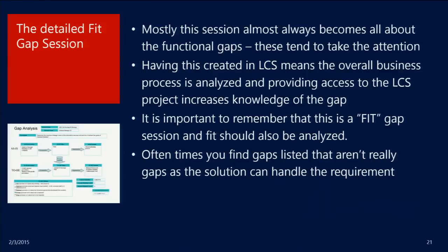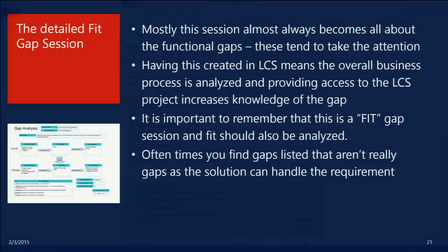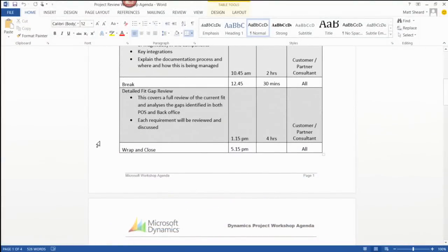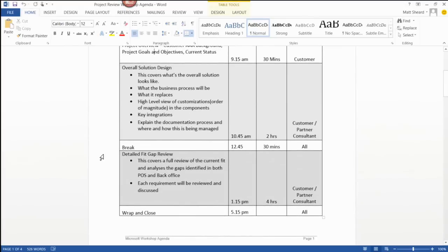One of the things that we see, again, it's very common on the customer side, the customers will supply the SMEs to the project. But those SMEs quite often don't understand the complete end-to-end process. And so what you have to use is techniques to make sure that you're drawing those requirements out that that specific SME may not be aware of. And by showing the application, by walking through the processes, it puts it into more context. And those SMEs will actually then bring in the right resources as necessary to make sure that we're getting the right answers. But it's so common, they may understand the happy path, but it's the exceptions that end up having the big consequences to the delays in a project.